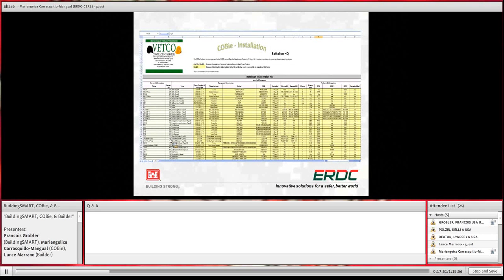That's what I was told by the contractor, and what you're seeing on the screen is the information provided by the subs and the contractor back to me. So what we do when you receive this information is merge it back to the actual model. And then you obtain this: a complete fill out. I apologize because I know it's little, in order to fit it on the screen. So you now have all this information filled out.